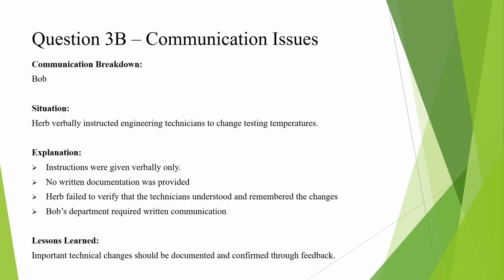All right, the next communication breakdown happened between Herb and Bob. So Herb verbally instructed engineering technicians to change testing temperatures. Instructions were given verbally only. There was no documentation put into place. Herb failed to verify that the technicians understood and remembered the changes.